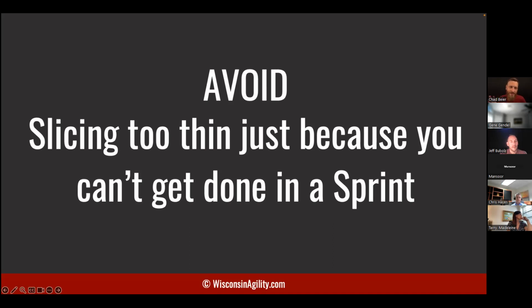I know this is not a software example, but run with me here. Imagine on day 1, they plant one shrub, thin slice, they mulch that area, and then they go home for the day. I'm going to inspect what happened and immediately catch the fact that that mulch is the wrong mulch. And now it's less rework to catch that.